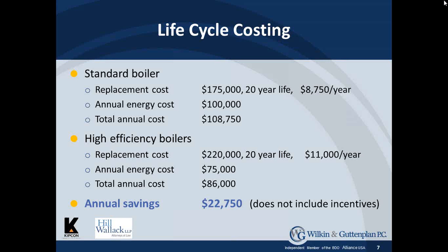And I will mention, in the state of New Jersey, there are many, many incentives available for replacing anything that uses energy. But this is an example of life cycle costing and why you should not just look at replacement costs, but you should also look at the cost of energy, or in some cases actually the cost of maintenance.